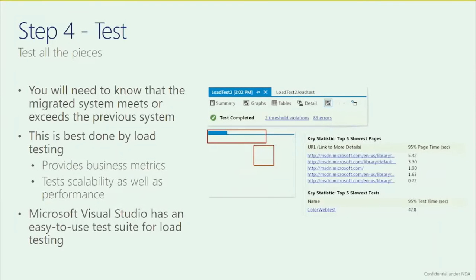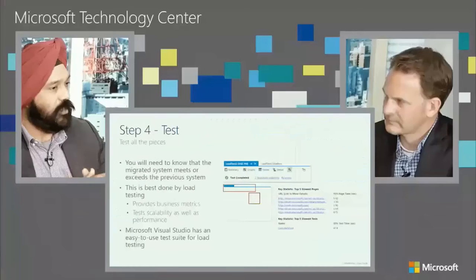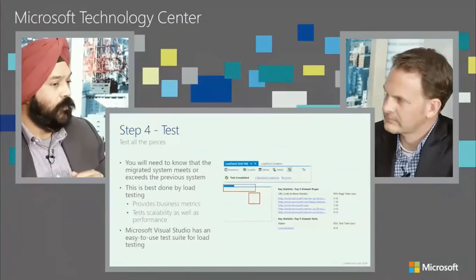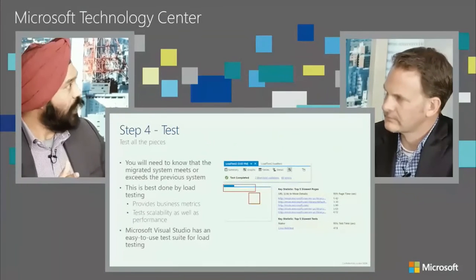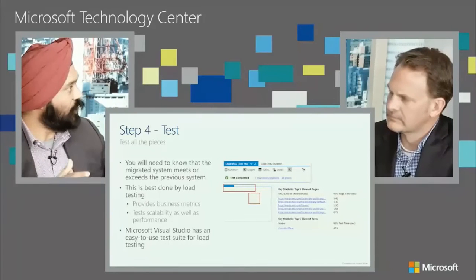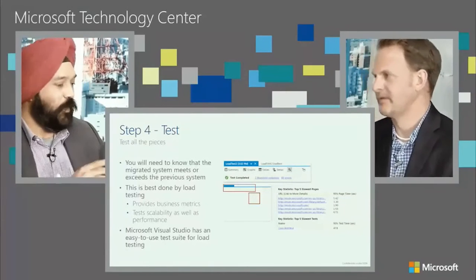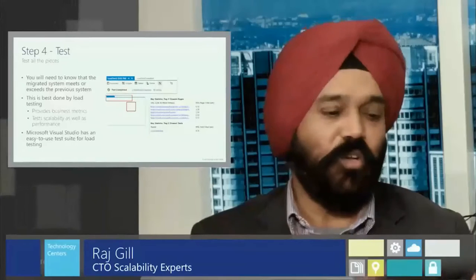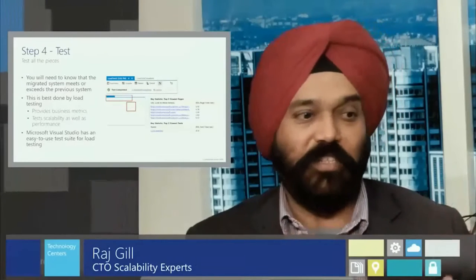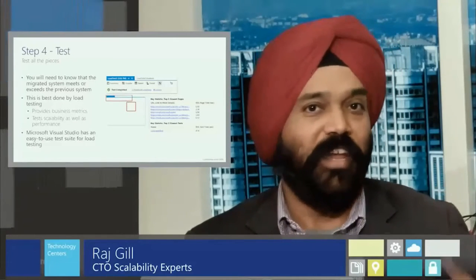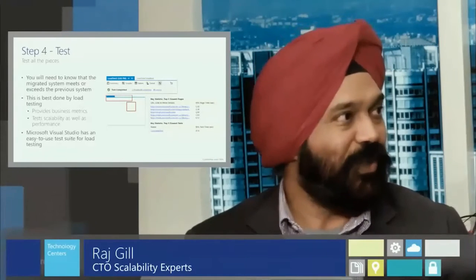And I'll tell you another reason why this step is called out separately. In order for a migration cutover to be sanctioned by a customer's internal departments, you need a sign-off. Right. So you want to make sure you get a sign-off from the application owners, and they will probably need to see what tests you ran and what the results were, so they can sign off on it.